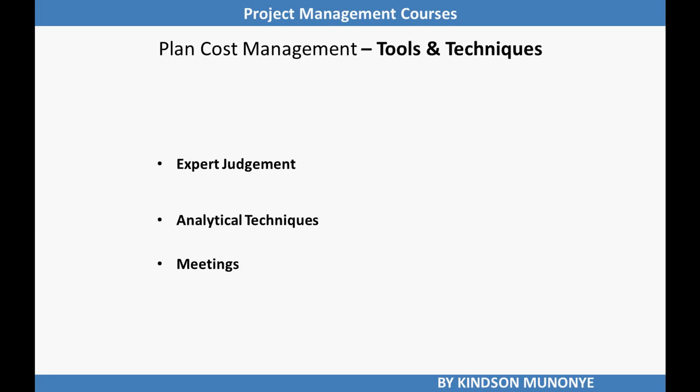Some analytical techniques that can be applied to project management planning include the payback period, which refers to the amount of time that will be expended before the initial investment is recovered. We also have return on investment, internal rate of return, discounted cash flow, and net present value. All of them are part of the analytical techniques that can be used in planned cost management.